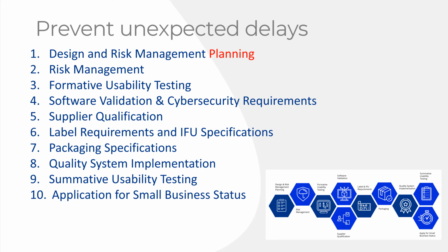Or they have a different battery supplier, and the different battery is a different size, so it has a different footprint, so it has a different housing, and they have to redo all their electrical safety testing. These little tiny supplier qualification changes. So you went from one supplier to another because the supplier that you used for prototyping won't make it for production, or you need to reduce costs. You need to think about these decisions earlier and qualify the production supplier earlier, get them to source components earlier, because otherwise you're going to repeat all your testing.